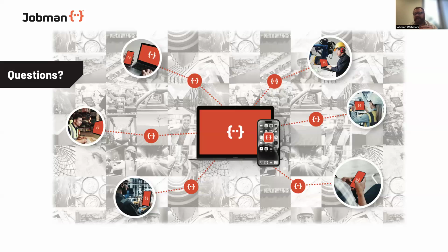However, Blum typically has multiple distributors throughout their network. So in Australia, for example, you've got Wilson and Bradley, you've got Lincoln Century, and you've got Blum. You can buy it from 3 different places. So the key to the software is we need to isolate and delineate directly to the supplier SKU, because when you place that order, and it's the same as Microvellum, for example, your CAD software uses the supplier SKU, because that's the field, that's the thing. When we place that purchase order, I need to order that from someone. Who I order it from is a different case, but the SKU is delineation there.